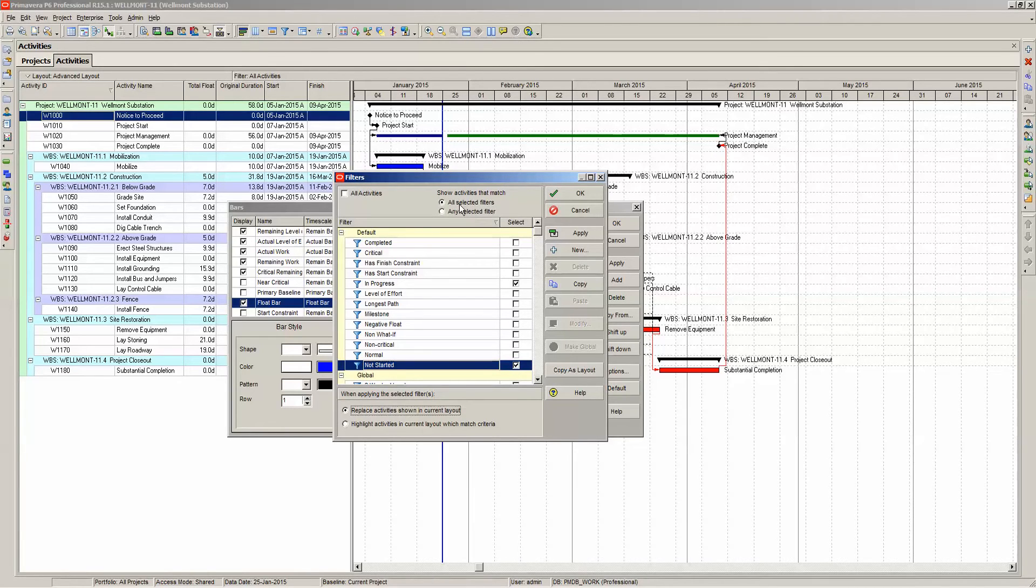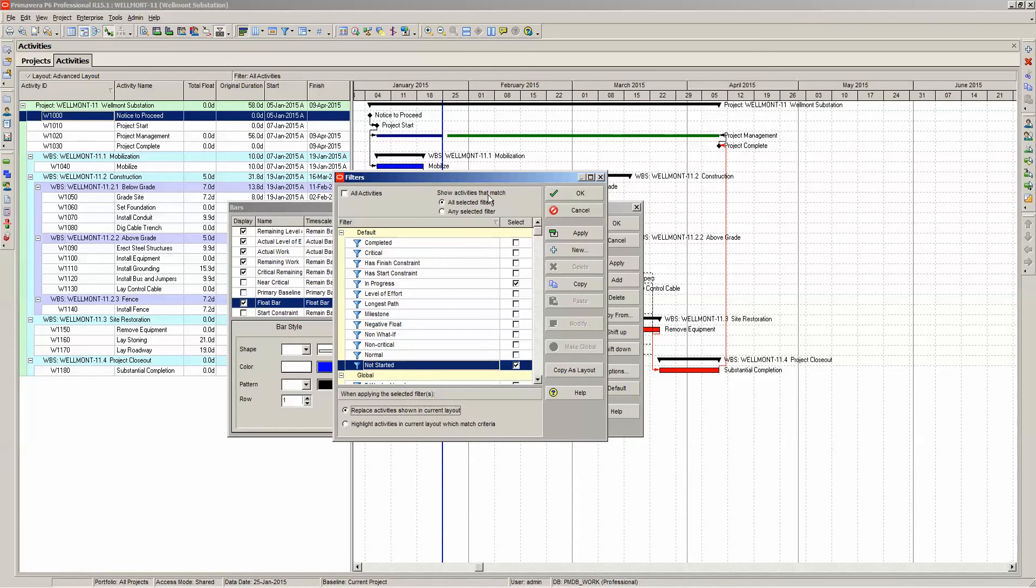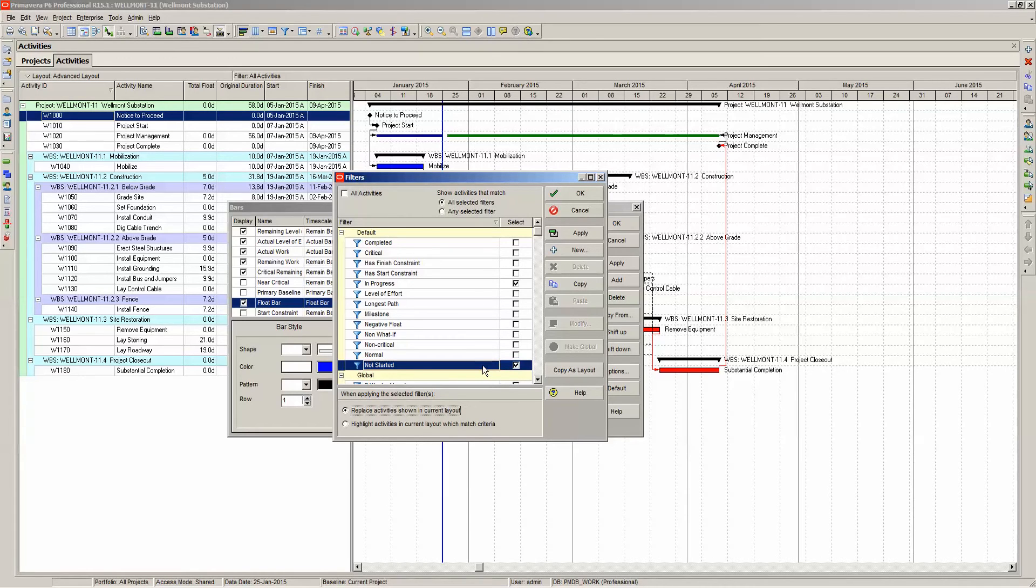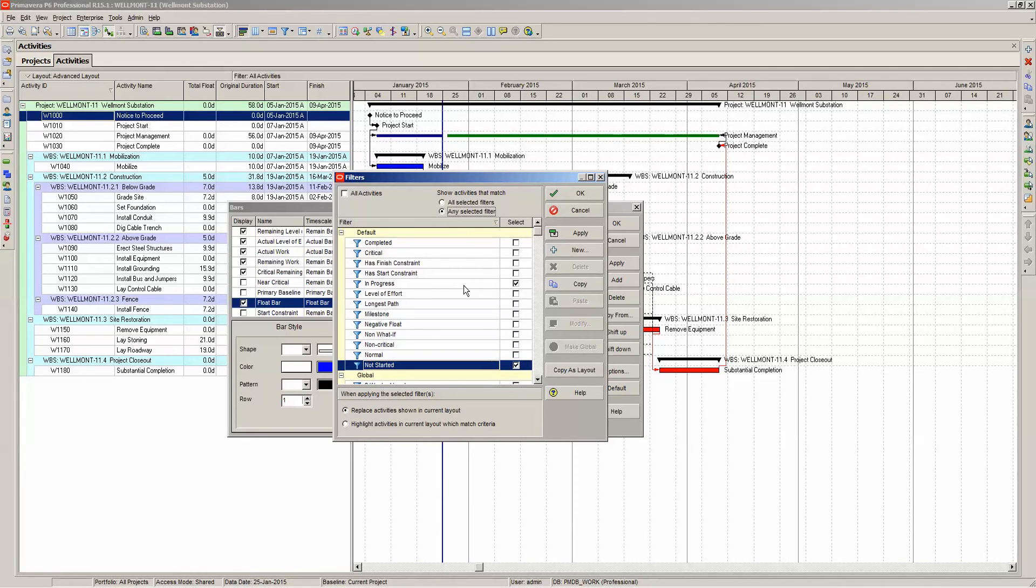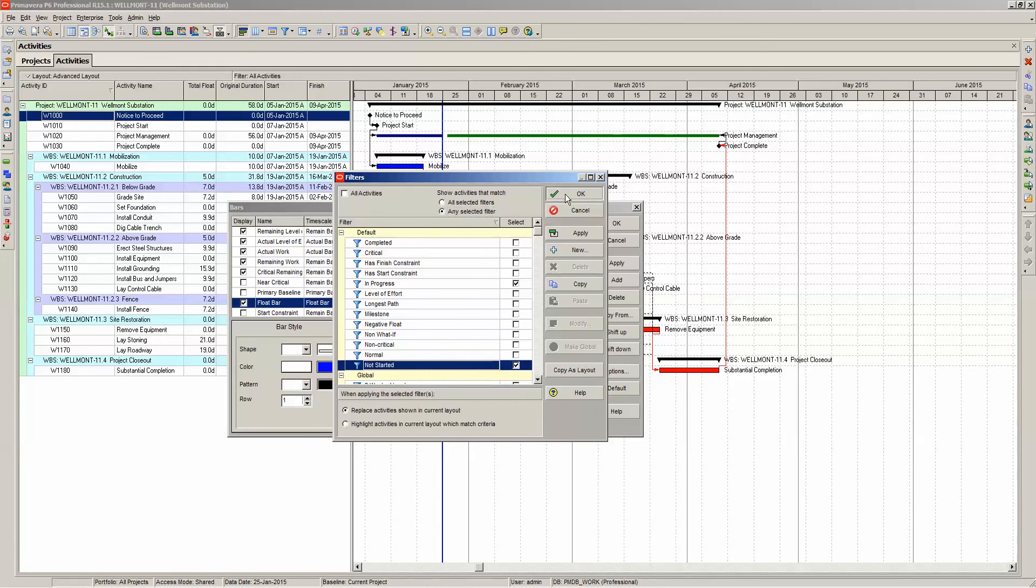Here we've got it set to all selected filters and this puts an AND after each filter you select. So this is saying that it is going to be all activities that are in progress AND not started. Well that doesn't make any sense because there are no activities that are in progress and not started. So we want to select the any toggle. So this now says all activities that are in progress OR not started. Then hit OK.